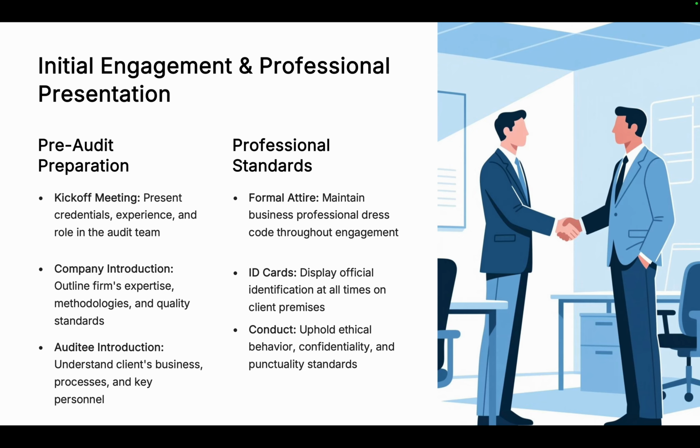In the kickoff, you need to get a PPT done with respect to the work scope you are going to cover, with respect to the data requirement, with respect to the credentials of your whole team which is going to be there at site. All those things have to be covered there with the credentials of our company. Where we are from, from which date we are working, where we are, our presence, where we are present ourselves. So all those things have to be in the PPT. Every TL has to get that PPT ready before reaching the site. And once we are at site, we need to start our site with that PPT only.